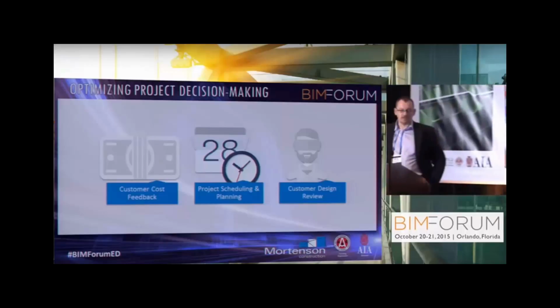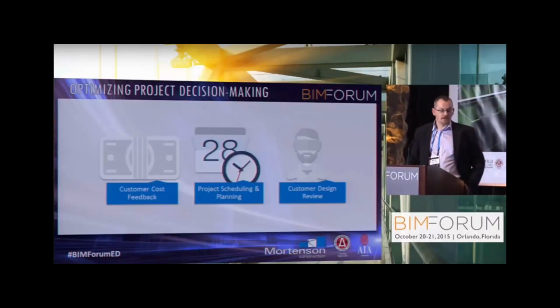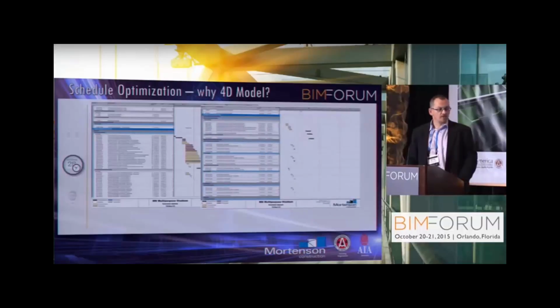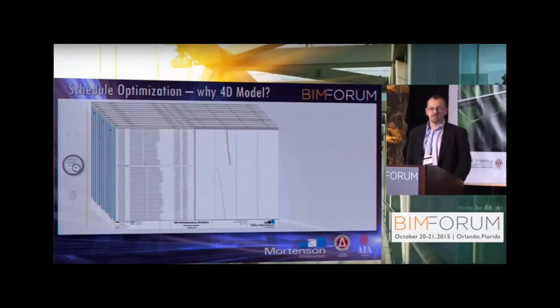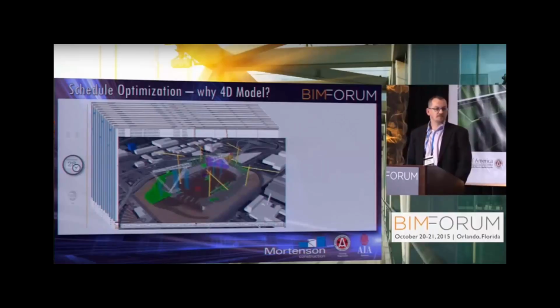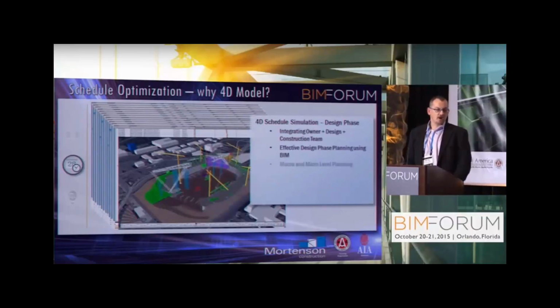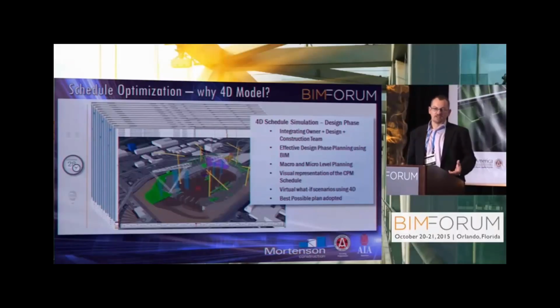Help optimize the schedule and help with the planning of the construction early on. We have a typical schedule over here, right? Pages after pages of the Gantt charts, and our customers not necessarily understanding properly what that means. And the 4D model, which we are using as a tool for communicating this, is a much easier to understand way of communicating that schedule, communicating that plan, making sure that our customers really understand what our plan is.